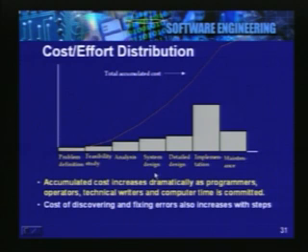This effort distribution is important for us to understand, because it clearly brings out that we must take all efforts to remove errors as early as possible in the life cycle. We must discover and fix these errors as early as possible, because fixing them subsequently will be a very costly operation. So, suppose there is a misunderstanding, or the analysis phase has not clearly identified the functional requirement.